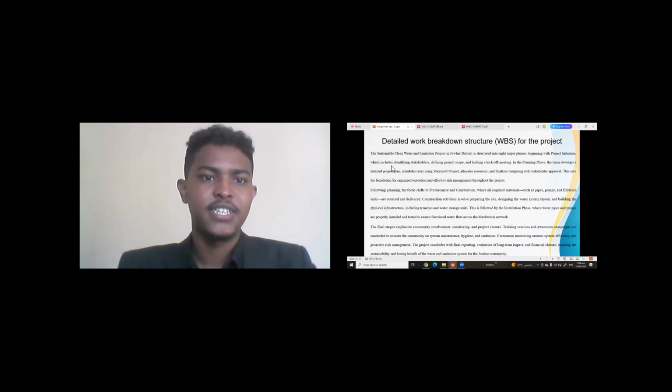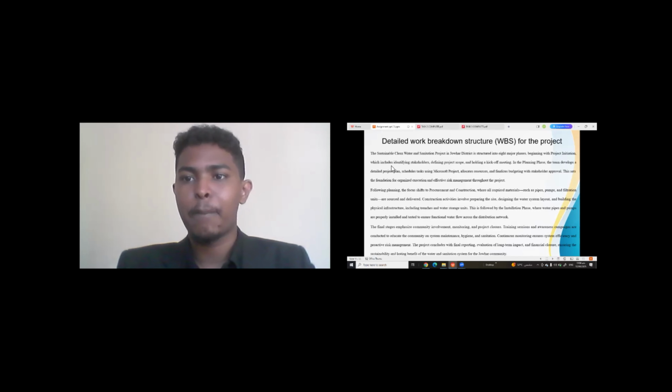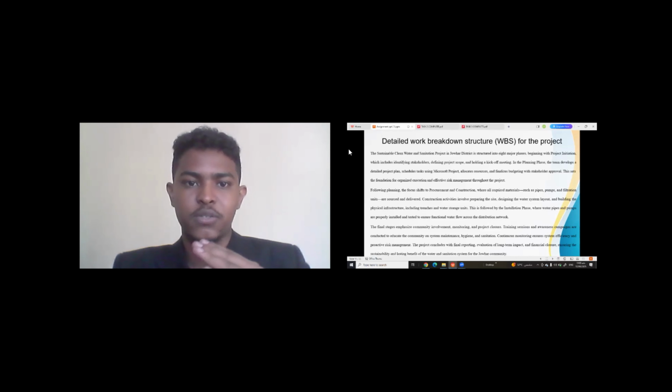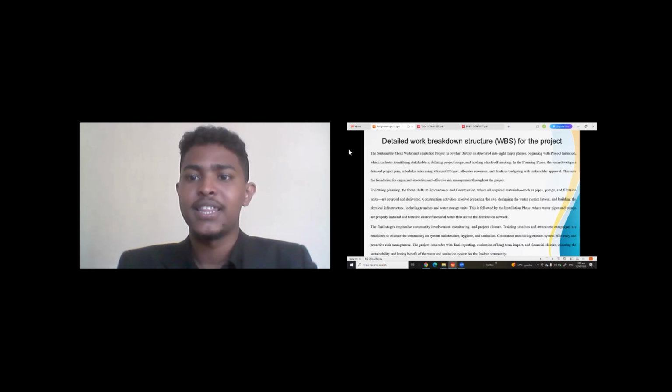So this is where we talk about the work breakdown structure, or WBS. This sustainable clean water and sanitation project in Johor district is structured into 8 major phases, beginning with project initiation, which includes identifying stakeholders, defining project scope, and holding a kick-off meeting. In the planning phase, the team develops a detailed project plan, schedules tasks using Microsoft Project, allocates resources, and finalizes budgeting with stakeholder approval.